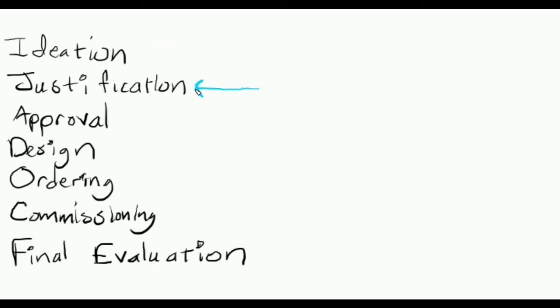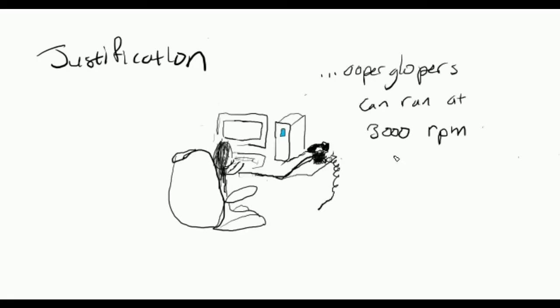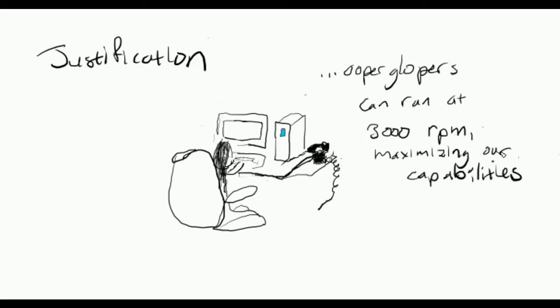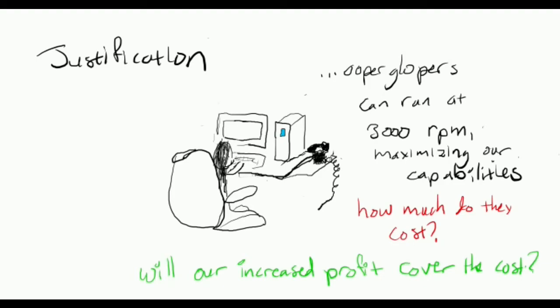Phase two, justification. Once we've collected data on the current state, I'll research into how the change would impact the current state. Will the cost decrease? Will it remove working hazards and improve our safety? Will it make us more efficient? How much more efficient? Does that improvement justify the cost and time to design, purchase, and build this new thing?